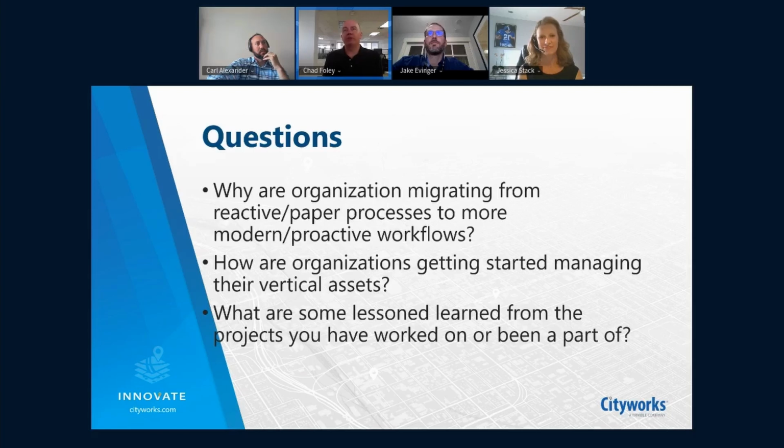A treatment plant is really mostly just motors, pumps, and valves. We don't want to get too bogged down with infinite amounts of gear that we don't necessarily care about or want to report on as much. If a motor costs 40 grand to replace, we do care about that. So that was a big lesson learned on the granularity of what we're tracking and what we want to report on.